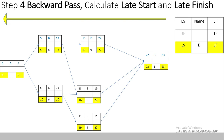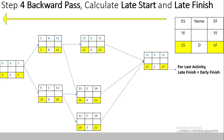Step 4 is the backward pass, where we calculate the late start and late finish of each activity, going from right to left. The assumption for the last activity in any network is that Late Finish equals Early Finish. The early finish of Activity G is 23, so the late finish is also set to 23. Then, Late Start = Late Finish − Duration. For Activity G: 23 − 1 = 22.